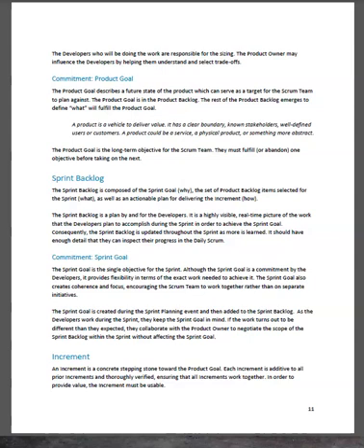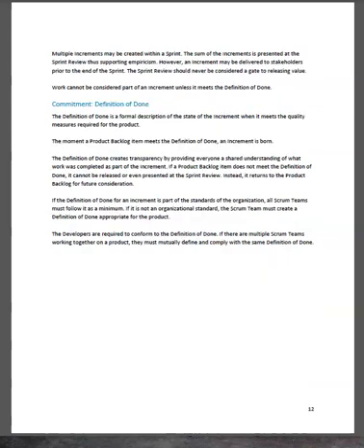Increment. An increment is a concrete stepping stone toward the product goal. Each increment is additive to all prior increments and thoroughly verified, ensuring that all increments work together in order to provide value. The increment must be usable. Multiple increments may be created within a sprint.